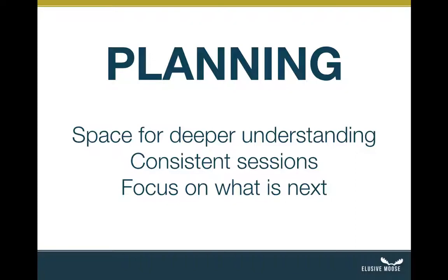So while you can get an overview and you can write features and you can say the software will do X, Y, and Z, it is very difficult, even if your chosen framework suggests that you should do this. The Agile one doesn't, but it's very difficult to collect all of the detailed requirements that you would need during that initial discovery. So you're going to plan a more detailed way along the path, right?